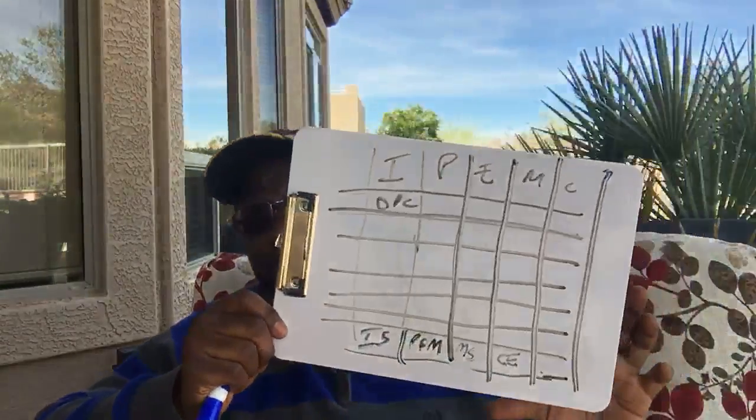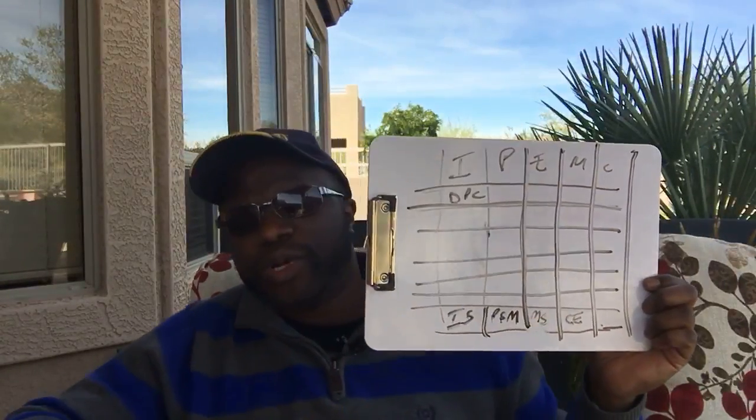I got my project charter out of develop project charter, send that to collect requirements, get my RTM, get my requirements documentation out, and then from my requirements documentation, head to create WBS, get my scope baseline out. From my scope baseline, that funnels back into develop project management plan, right? So there are all sorts of ways you could look for 1 degree of separation, 2 degrees, 3 degrees, 4 degrees. But it's all here in the matrix.